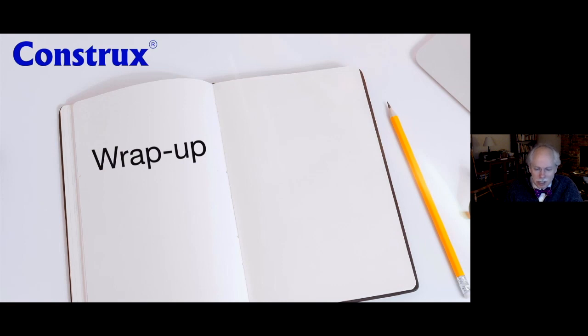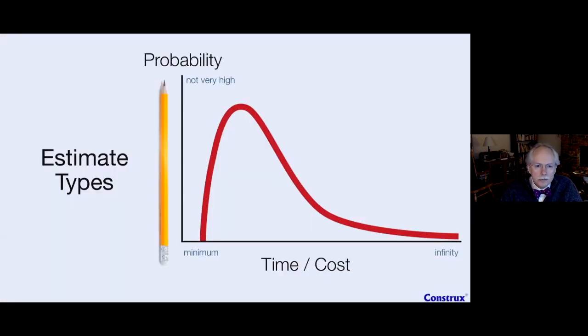So my three estimation types. Well, it all starts out with this idea of a probability, right? We have to have a probability to understand what these estimation types even are. And from this probability curve, we're going to be picking some types. We start off by picking what I called, let me just go ahead and draw it, my ambiguity. Ambiguity because the gut here says 25%, and that's not going to be happening on any project, but it helps me find ambiguity, especially on Scrum teams, and we're going to see that using story points and task estimate hours. Those are using the ambiguity point.